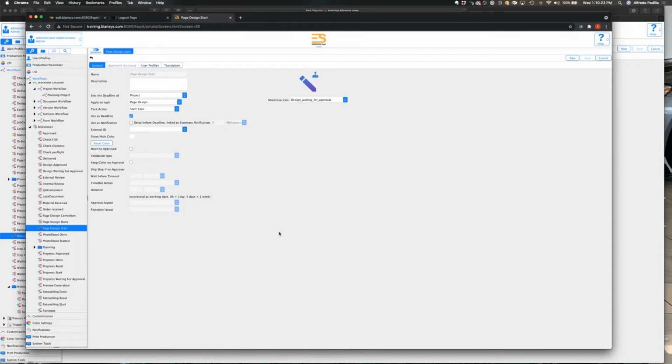and these will work, and I'll show you the document workflow in a little bit, but they're going to work a lot like what we were used to doing if you build a document workflow and you really wanted to milestone it up, right? So you had a milestone before every approval, milestone after that's done, the correction milestone. So you had kind of 3 milestones associated with every approval step, or if you're sending it to twist or anything like that, you had all these milestones that were just decorating the whole workflow up, showing exactly where the file was as it went through. And then we used to have the send events linked in there too. So it was telling the project workflow where to go.